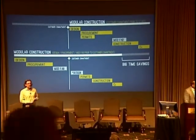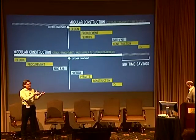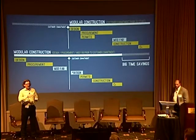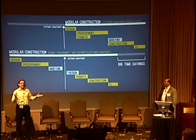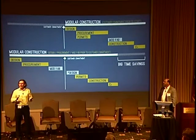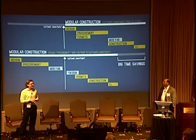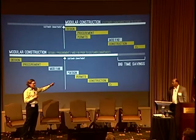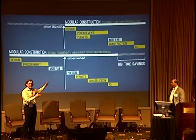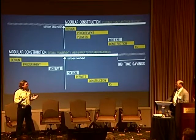What's interesting is, as we look at these different modular solutions and the providers that are out there, some of them here in the room, I think it'll take time. As Jason has pointed out, there might be some standardized designs or design approaches that could be accepted by the market, but who's going to go buy 30 million worth of switchgear, UPSs, and distribution on spec, prior to the customer commitment, to be ready to go and obtain that time savings?